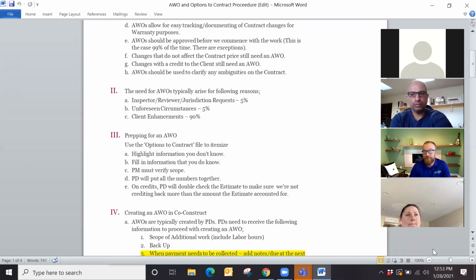So if anybody knows how you install Ditra, what we had to do is... it's a very, very upgraded tile install that came standard with the house build because it was a relatively new house. And we did not know that it was there. So when we started pulling it up, it's all that underlayment that gets put down there. And then we spent 2 extra days sanding the floor down enough to get down to the subfloor in order to convert it over to the hardwoods.